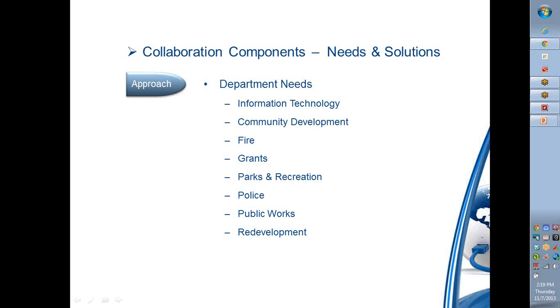We also came up with a couple of extra things. A survey that would be sent out prior to the interviews that would get us some background information and get them thinking about what kind of questions we would be asking in the interviews. And then we also need to compile all the information from both the surveys and the interviews, and then assemble all that information into the presentation that we're going to get back to the city for the needs assessment, at least our portion of it.